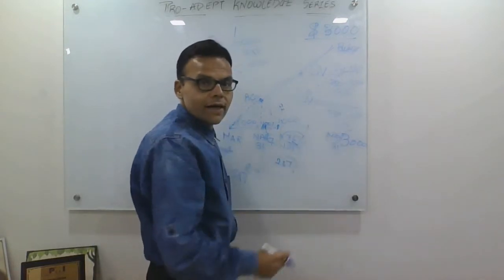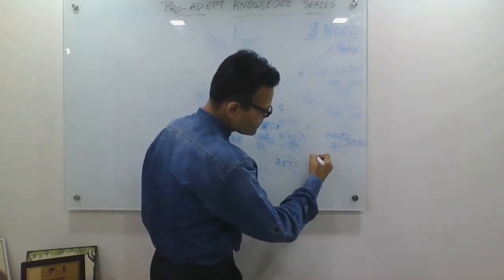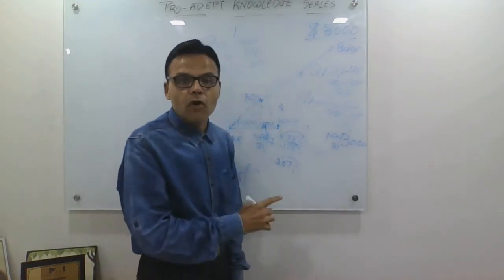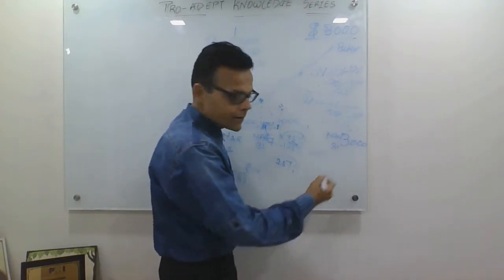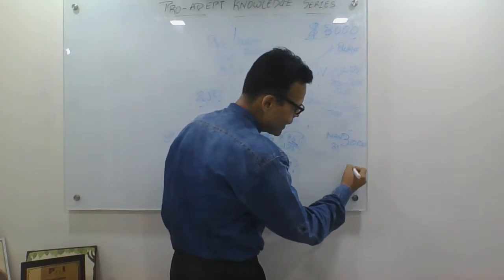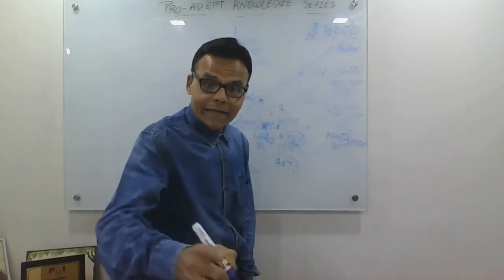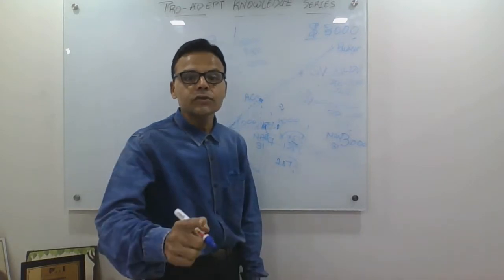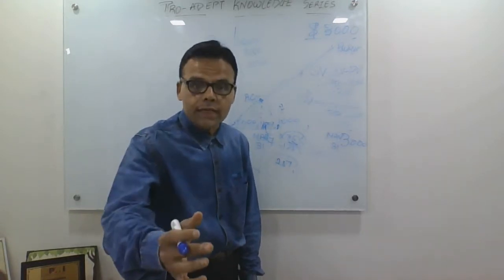So when I talk about relative measure, I always talk about something called Schedule Performance Index, which is nothing but earned value divided by plan value, which will give you a comparative measure in terms of how you are doing in your project on schedule.